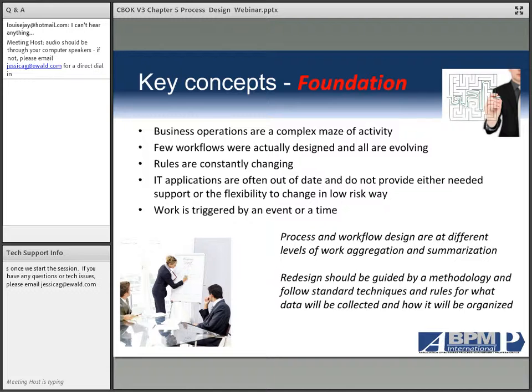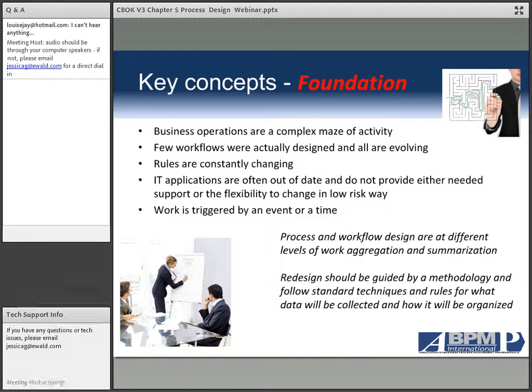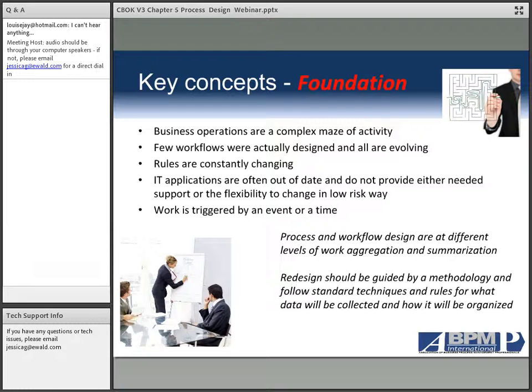It's one of the problems IT has had in the past, that by freezing systems, by having to stop and essentially say, we're going to take a snapshot in time, what you wind up with is delivering something that is out of date by at least as long as it takes you to build it. So if it takes you a year to build a system, the service or solution that you wind up deploying is a year out of date to the business. And then you have all the change management. It creates a situation that's been very difficult. With iteration, with the BPMS tools, with what we have available now, we can change quickly enough that the majority of that problem can be negated.